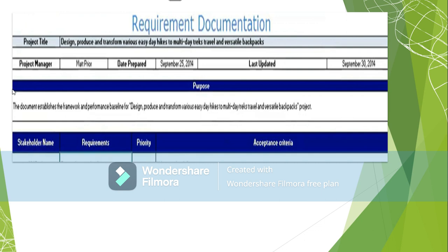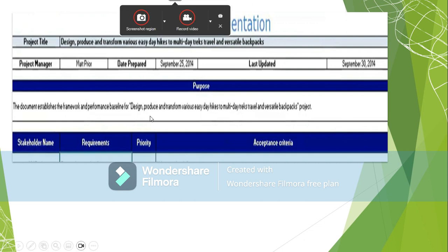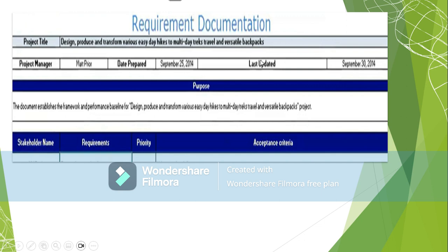Then we have date prepared, and last updated. When it was prepared, it can be a lapse of 5 or 6 months between the creation and the update. And we do have the versioning also. At times, if somebody is making even a small change in the document, they update the version, like version 1, version 1.1. If there's a small change within version 1, it can be version 1.1, or if it's a lot of change, then it can be version 2. So that is all written in the starting pages of your documentation.